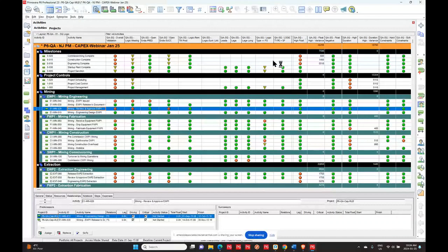Well, you can set criteria inside P6-QA as well. So if you're looking to set criteria, when you set up your checks and tell the software what checks you want it to do, you'll see that some of them, for example, if I said my successors, I'm okay with it having 1%, or I'm okay with durations being 40 hours. But anything larger than that, I want tagged. Now, I might say between 40 and 50 hours for a duration is a yellow flag. In other words, it's something I need to look into. And anything over that would be red. So you can set criteria that way as well. And we'll look at that a little more in just a couple of minutes here.